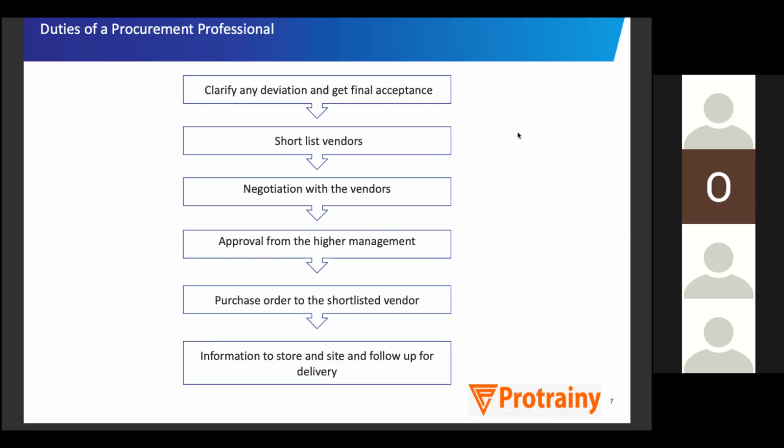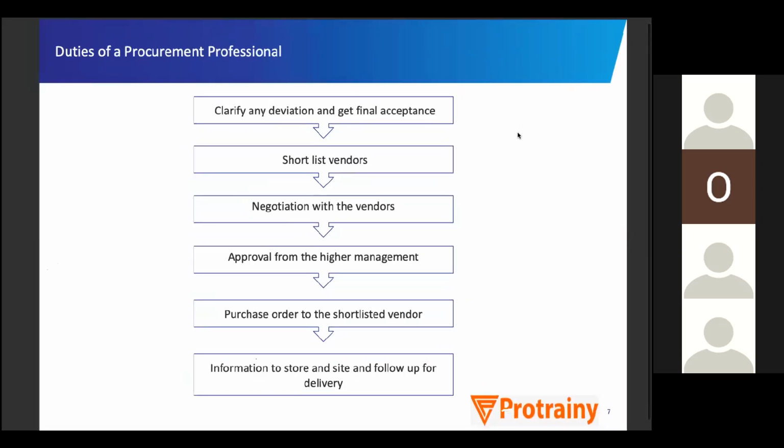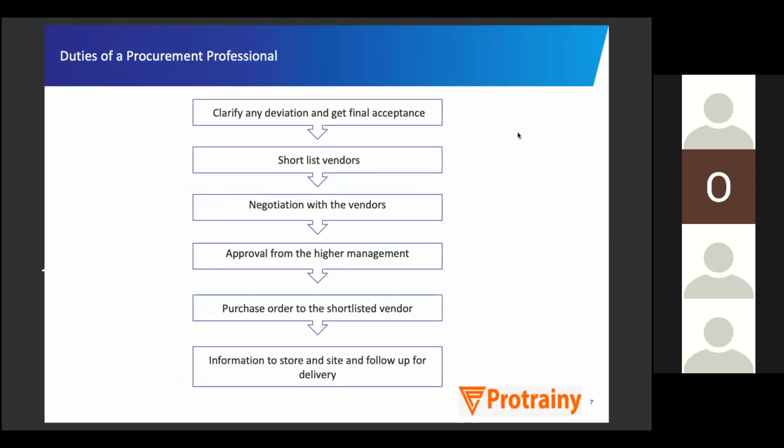after doing all this comparison and taking approval, the procurement guy will make the purchase order and send it to the vendor, and inform the site and store that he has followed up for the material, or he will also follow up for the material. So now you can ask any question you have in your mind related to the duties of a procurement professional.